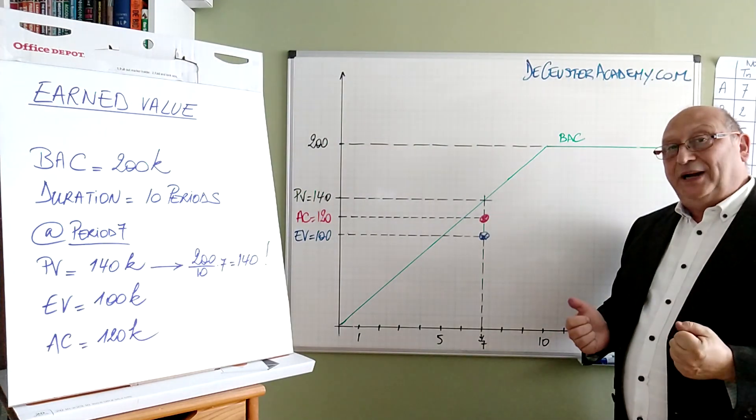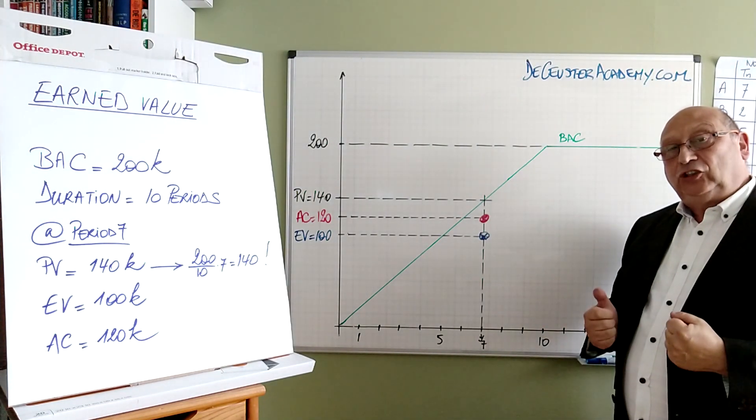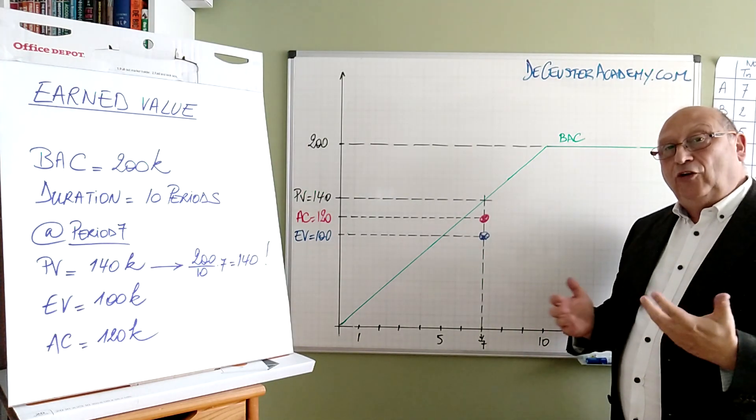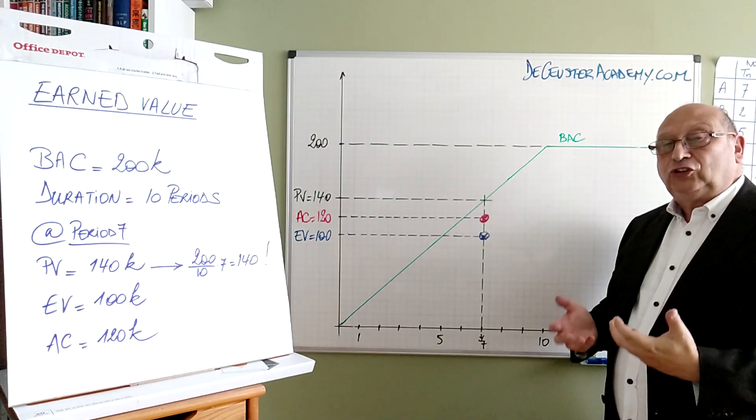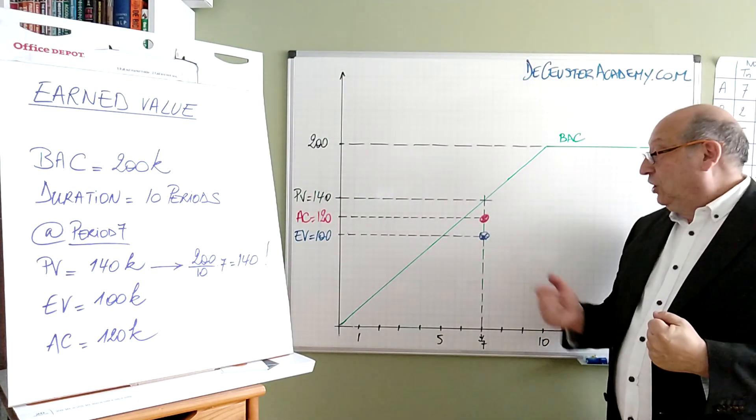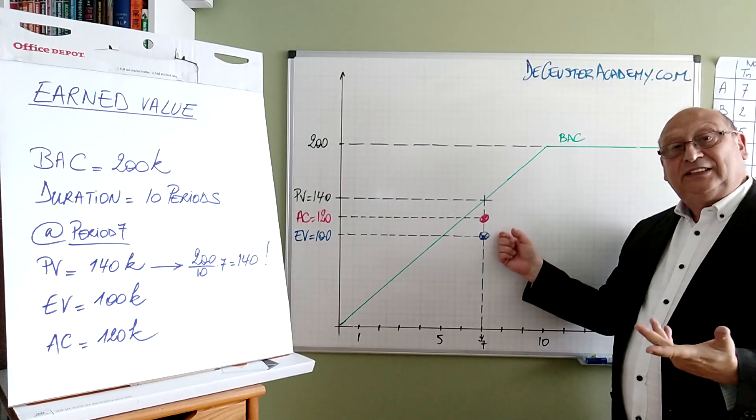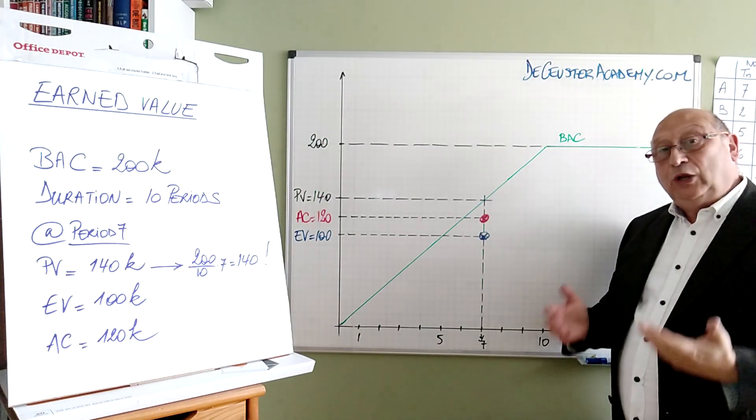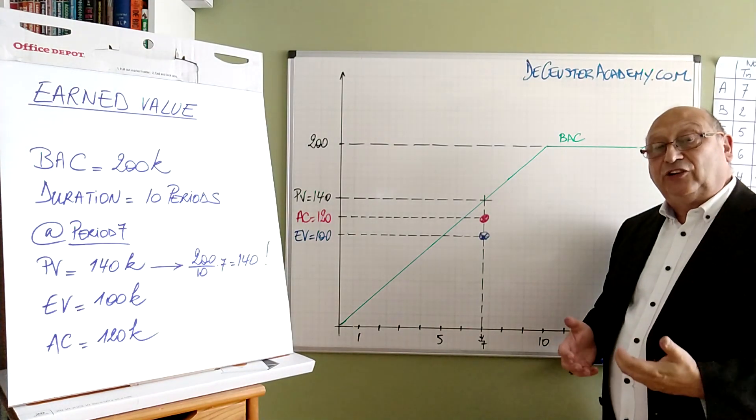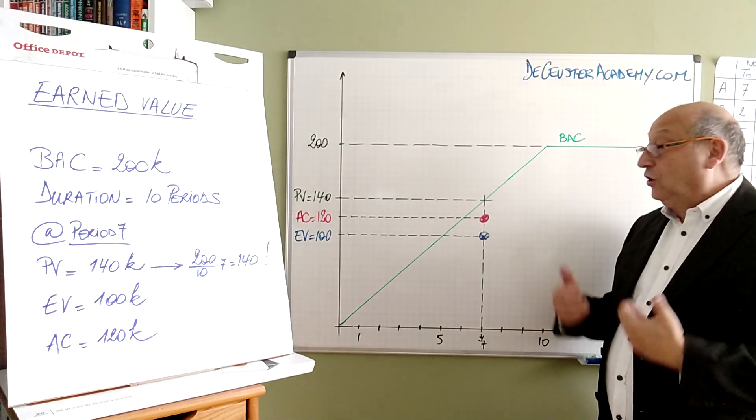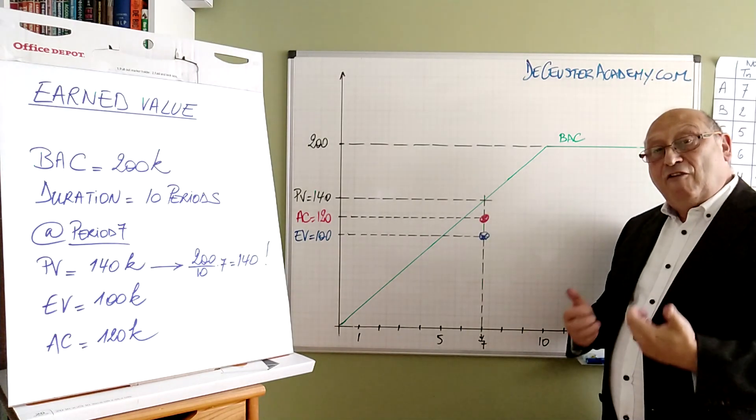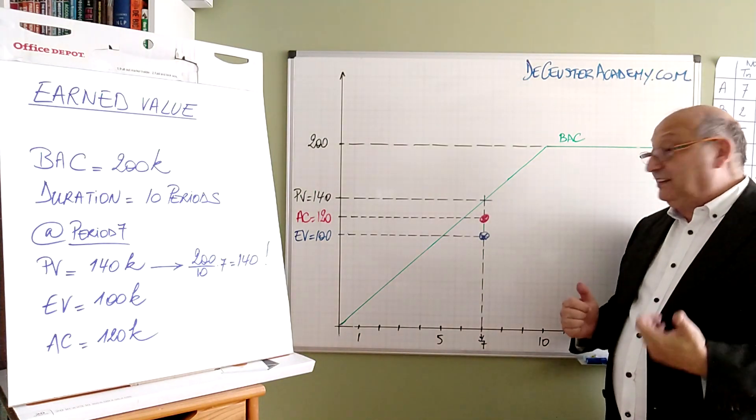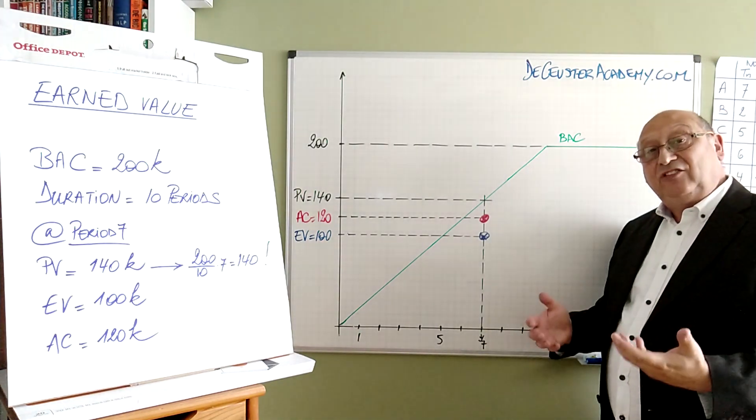And in earned value management we add some additional parameters. The additional parameter is earned value. And this is the cost of the deliverables that we created up to period 7. And we see on the table we have only 100k of deliverables that we created. We planned to make deliverables for a value of 140k. But we didn't. Basically this means that we are behind schedule.